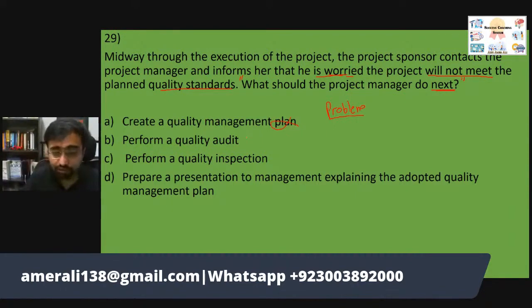Perform a quality audit. Yes, we perform an audit to check the processes, what is happening, where the processes are, all those things. Inspections are more of a deliverable thing. We do inspection to check the deliverables, how deliverables are doing. So I wouldn't prepare a presentation. So directly perform a quality audit. If there is a problem in the process and you think that it is not being solved properly, you need to perform an audit for that process, and that can solve the problem.